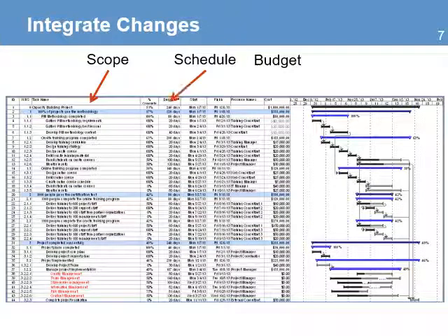Here's an example of a project plan. You need to make sure that for any new activity, you include the schedule information, the duration, start and end date, and the budget assigned for the activity. This is the plan that will be shared with the team, partners, and key stakeholders. So it needs to reflect all the changes to the core processes.